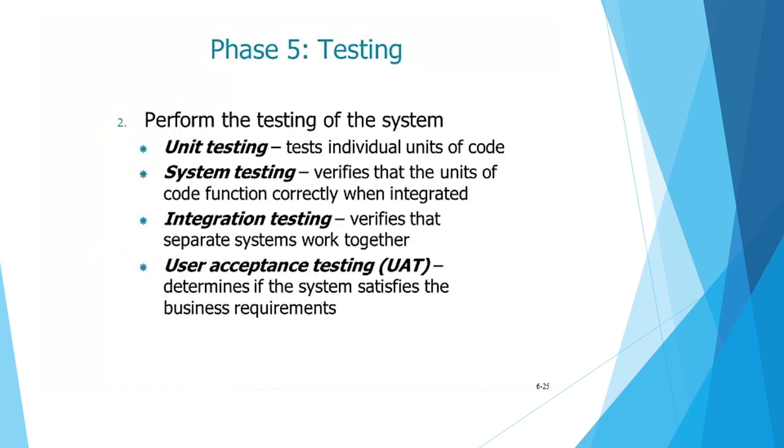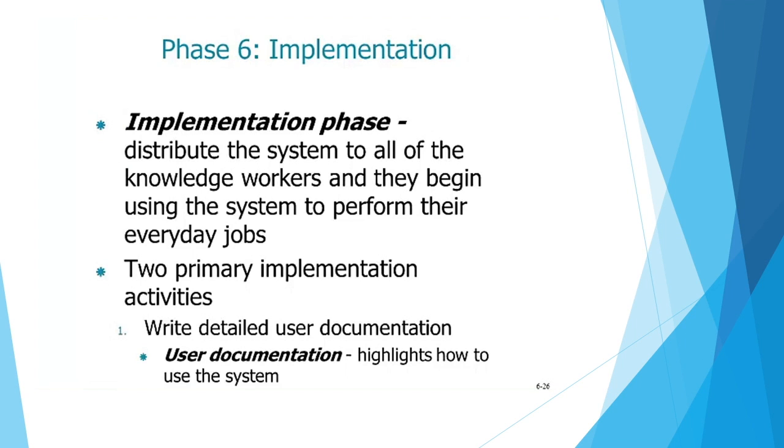Testing phase, it comes back into the organization if it ever left. It could stay inside the organization, and that's fine. Testing is where you're going to put it in front of some people. You run through some tests, some pilots. You can do some unit testing where you bring in little pieces of it and test it as you build it. Integration testing brings it all together and makes sure it works, and then user acceptance testing obviously is what it says. You're going to put some users in front of it and make sure it's doing the things they needed it to do.